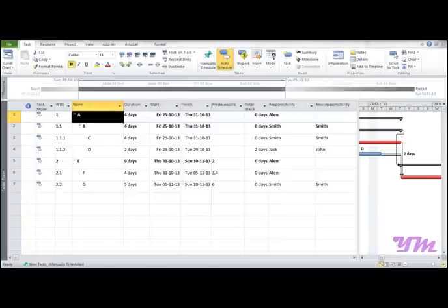Module 7, Recurring Activities. Say a specific activity repeats itself on a specific day of the month, specific day of the week, specific day of the year, or specific time frame during the year. Then we need not enter that activity or task again and again. Microsoft Project 2010 has a feature named Recurring Task, in which we can enter the task which recurs and mention the interval of its repetition. Thereby it would appear in our task list automatically, and we need not enter all the values manually.